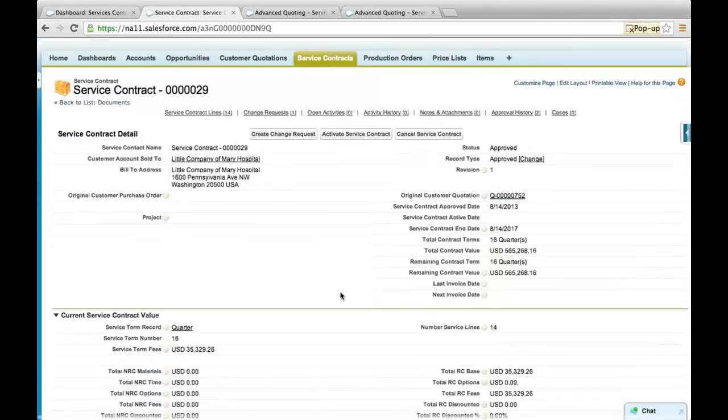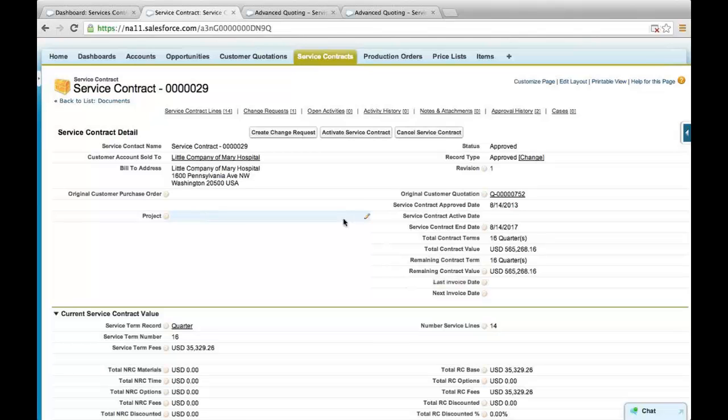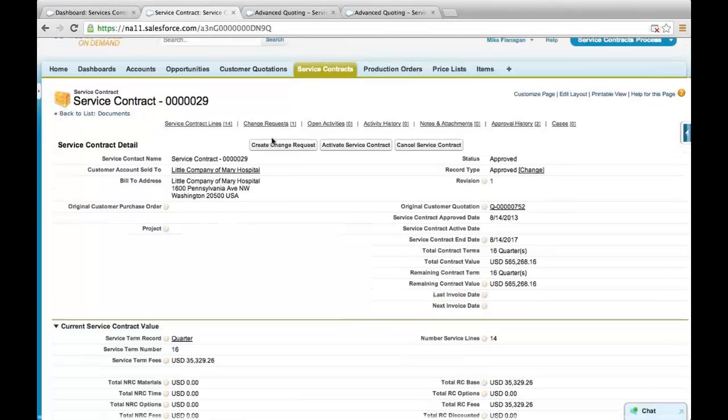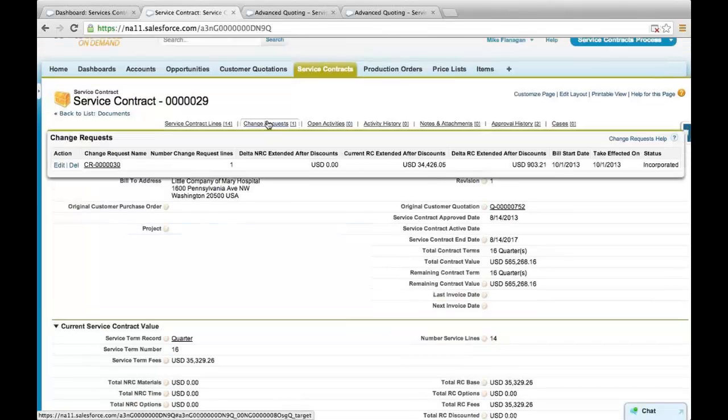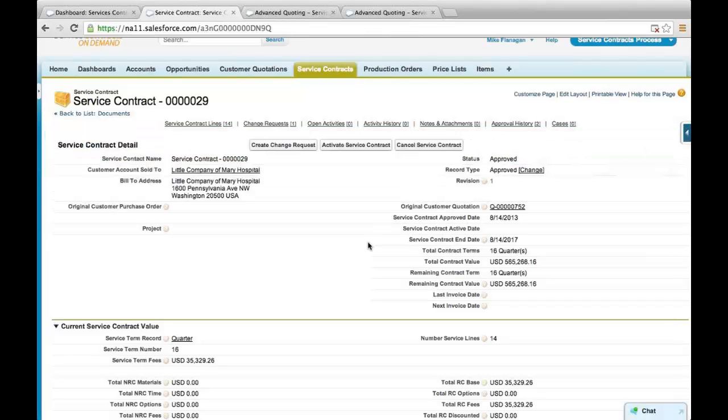In this case, we have a change request that has been incorporated in the contract that changes the fees by $34,000. So your contract will always have a current service contract value as invoicing and changes are incorporated against the original contract value.